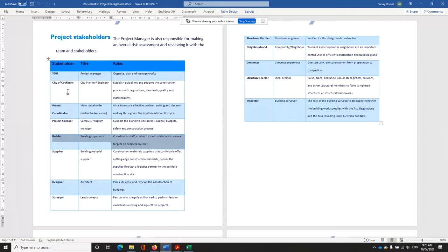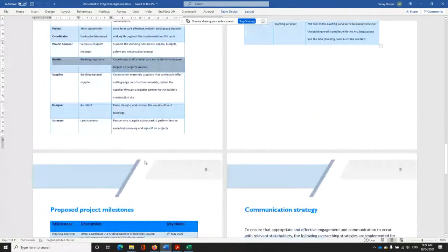Architecture is not required later. For example, a land surveyor is not required once the site plans are given; we don't need him later. So their contribution could be 10%, maybe 20%, right? But a building supervisor needs 100%. And you've got to allocate resources, level those resources in your project, and so on. Any of these roles, we'll discuss as we go through the session.